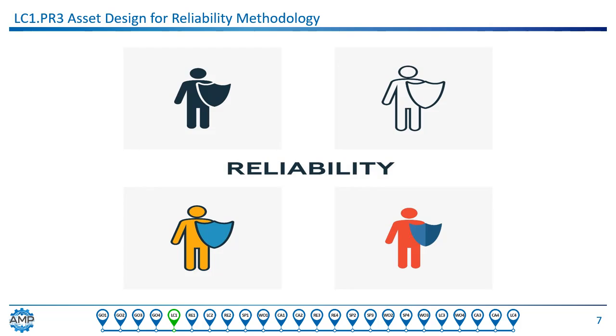It should be understood the project cannot proceed unless the DFR stage gates are satisfied. And even if the review becomes critical path, there can't be any shortcuts taken. This is necessary to change the tribal mindset and project practices by whatever degree necessary to realize that every degree of inaccuracy in these early stages is additive over the course of the project. It must be also made clear that it is much cheaper to make changes during the stage gate reviews rather than to make changes after the asset is turned over for operation. Think of DFR as the way accuracy is maintained over time.